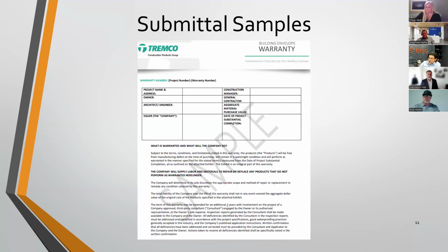And even bringing that all the way back now. So I said the material warranty as being arbitrarily the most basic warranty. Now, if you are to go ahead and go to the other extreme of an NDL, a no dollar limit warranty, that essentially means that everything is included, for lack of a better term. But as you can imagine, that's going to be a pretty costly item to cover.